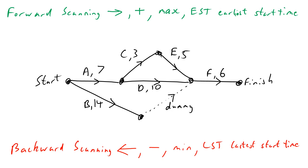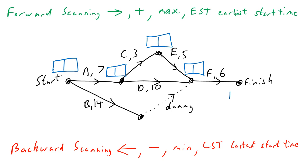The first thing you have to do is draw a box for every node. We've got the start node, then a node between A and C, another between A, C and E, a node for the finish, and a node at the bottom. Some of you might be saying why didn't I do two nodes at the start since I've got A and B — almost every textbook tells you to do that, but there is actually a flaw in that methodology, and I've specifically designed this question to show that flaw.